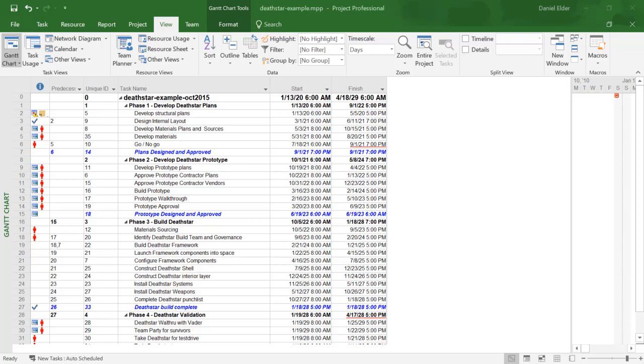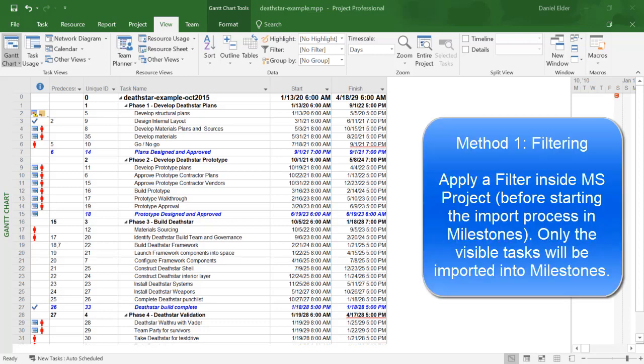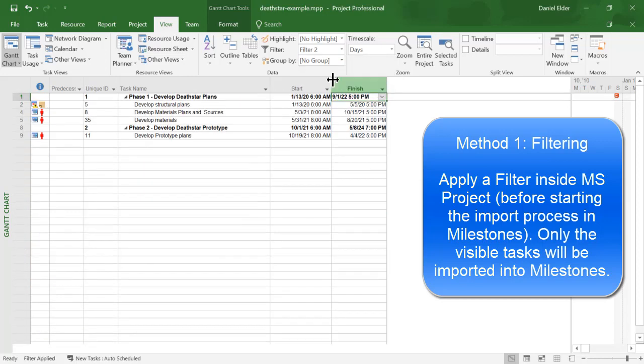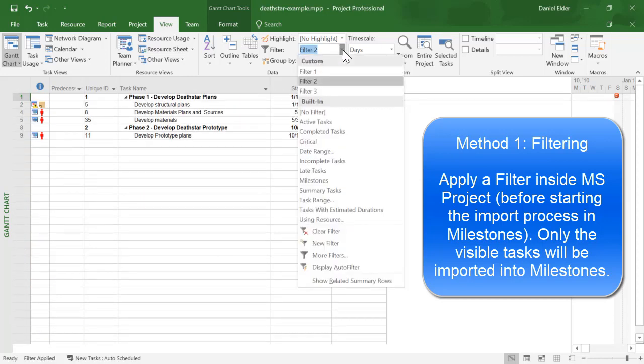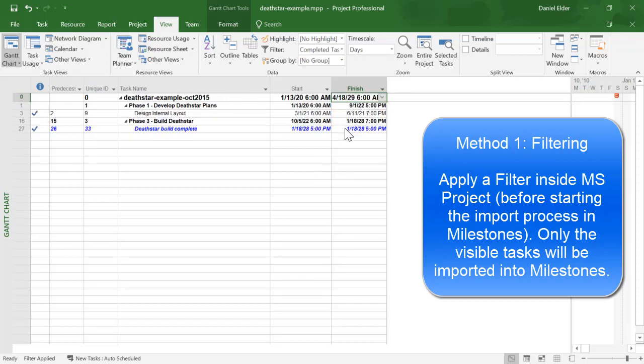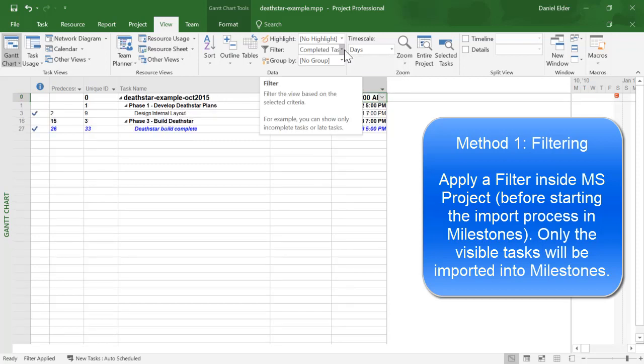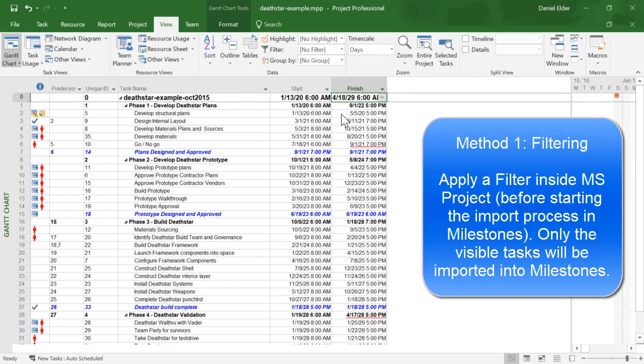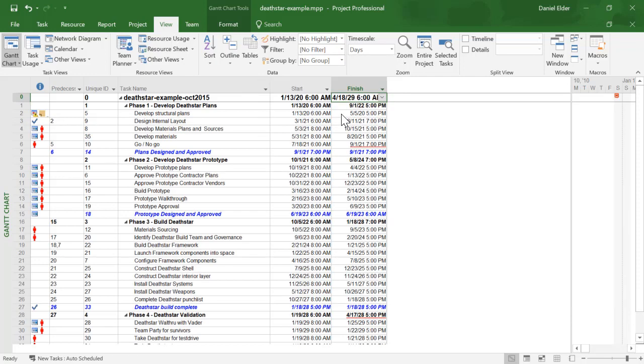The first method you can use is by applying a filter inside Microsoft Project before you begin the import process in Milestones. To use this method, apply whatever filter you want inside Project, and Milestones will only import the tasks that are visible inside Project. Just be sure to apply the filter before starting the import process.